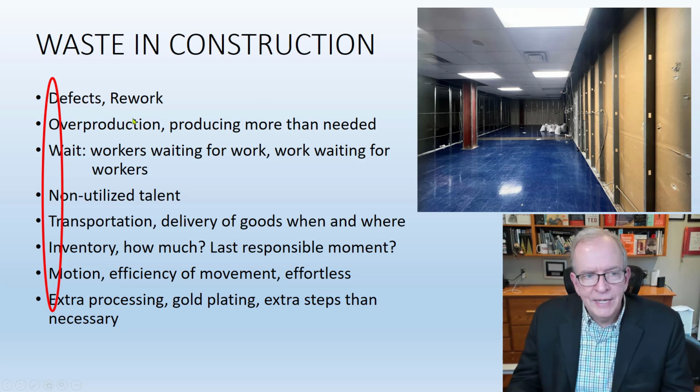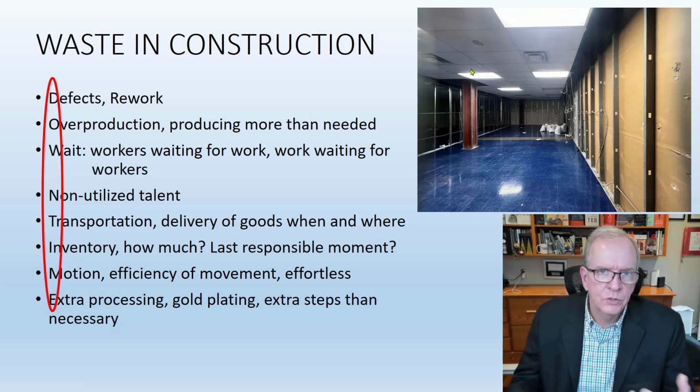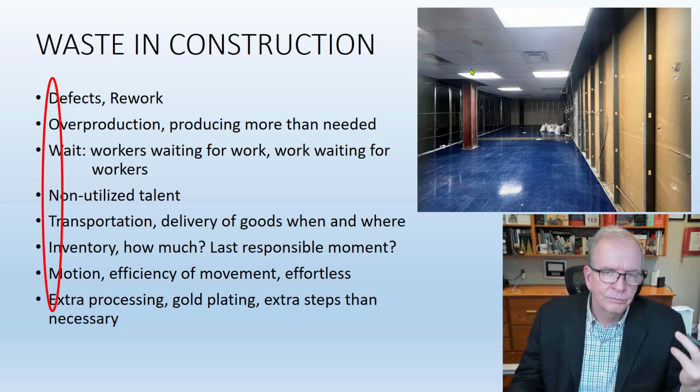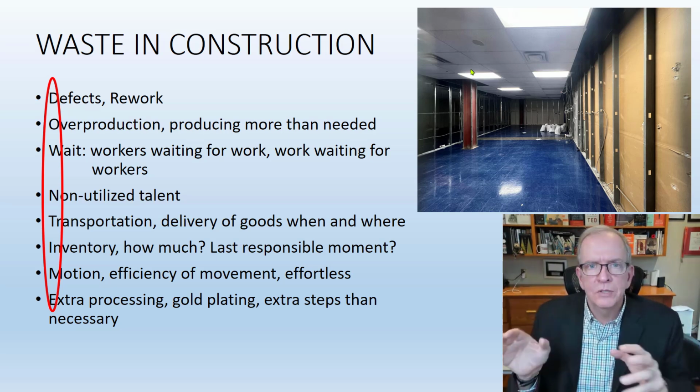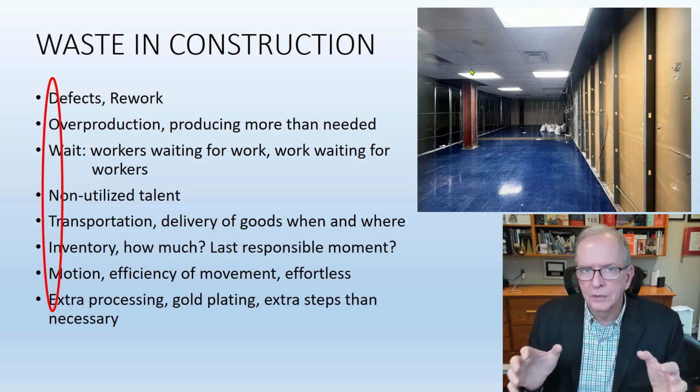Producing more than needed probably wouldn't be too big of an issue. Like if there was a change in some of the quantities of fixtures or something like that, you could charge for that in a change order. So you could likely recoup those costs. But it wouldn't be very good for the client, because you'd have to charge a lot extra for those costs. So again, getting things delivered at what we would call the last responsible moment would be much better, right?